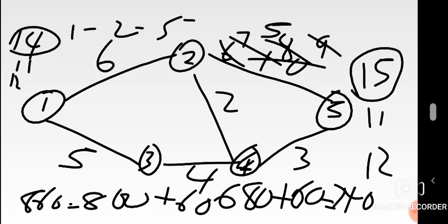We're on 5. We determine your critical path, 11, right? Okay, that one gives you 11. Then the other routes give you what? 1 to 3 to 5 gives 11, and 1 to 3 to 4 to 5 gives 12. Okay, apparently there is now one critical path left: 1 to 3 to 4 to 5.